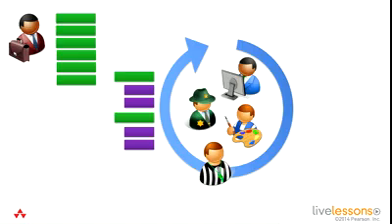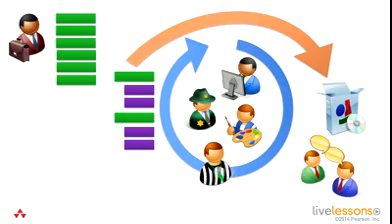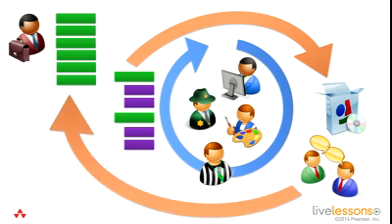And after a sprint, which could be 1 week to 4 weeks, they should actually deliver a product increment and do that in sprint review. Demo that to your stakeholders. Then figure out what you're going to work on next. Hold your sprint retrospective and talk about things that could go better and things you can improve on. And then you rinse and repeat the entire process, going back to grooming and back to the sprint planning. And the cycle repeats itself.